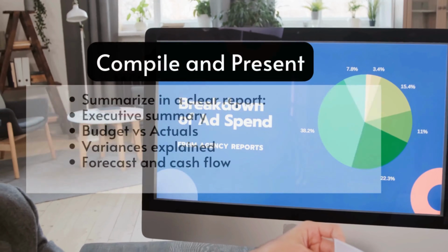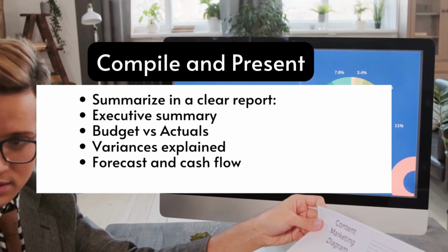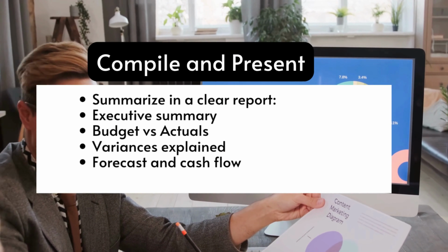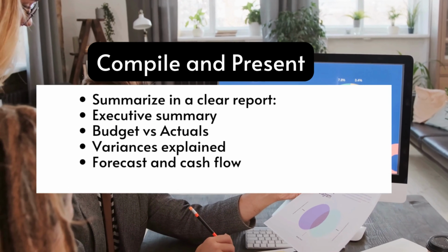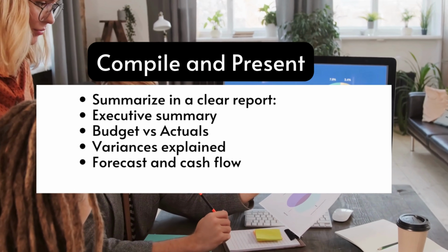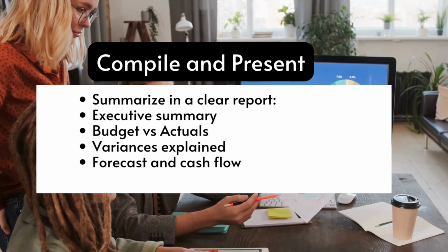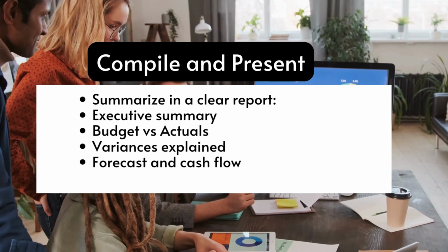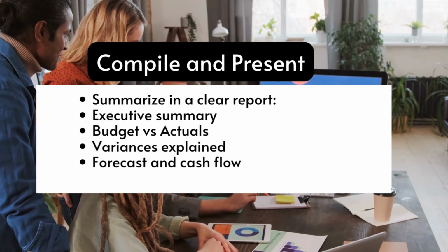The final presentation, you just need to compile a report, which is what a cost report is. It'll have an executive summary. It'll have a budget versus actual. This is where we are. This is how much the budget is. This is how much we've paid to date. And then you can share it in a presentation or report back with a review.